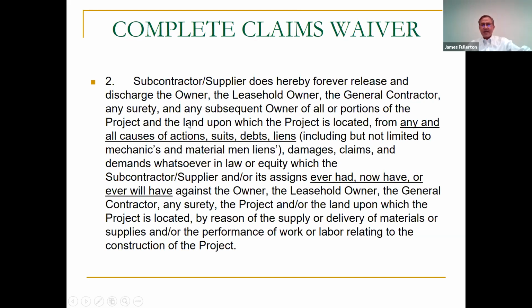In exchange for receipt of X number of dollars was in paragraph 1. Sub-supplier does release the owner, the tenant, the GC, the surety, the bonding company, whoever's going to buy the property, and the project from any and all causes of action, suits, debts, liens, which you ever had, now have, or will ever have against the owner, leasehold owner, etc. That is a very complete waiver, but I want you to focus on two things in particular.